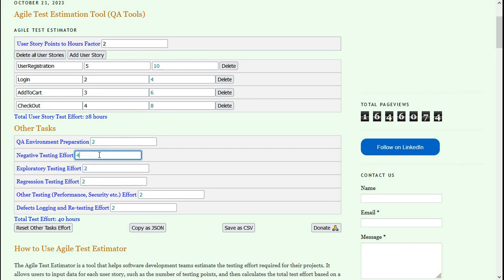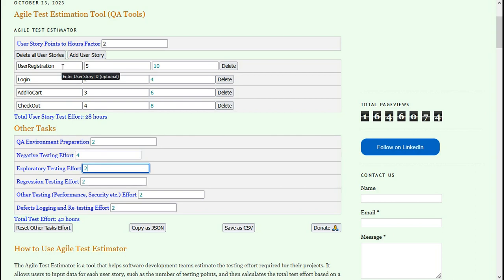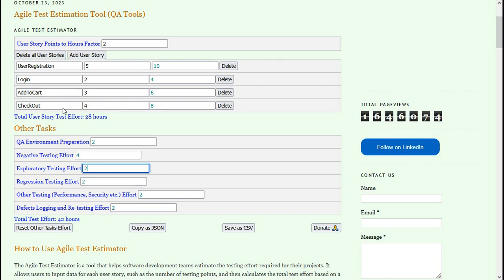Exploratory testing is for testing that is beyond the test cases. I have to do exploratory testing for user registration, different kinds of user registration, different kinds of login, then add the product to cart and checkout. It is going to take 6 hours.